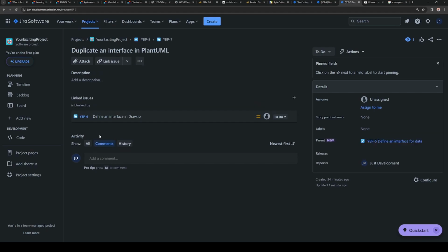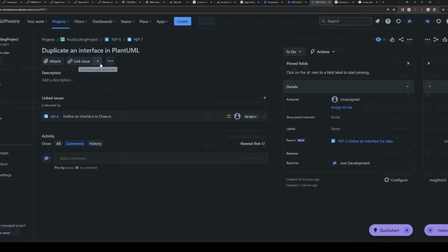If you feel that something is blocking you, then create a story and make it, because during the backlog refinement, quite often you go through the issues and see, oh, I have this one blocked by something, and then you go there and maybe you need to escalate a problem to a higher level, etc. So please use dependencies and linked issues actively if needed.